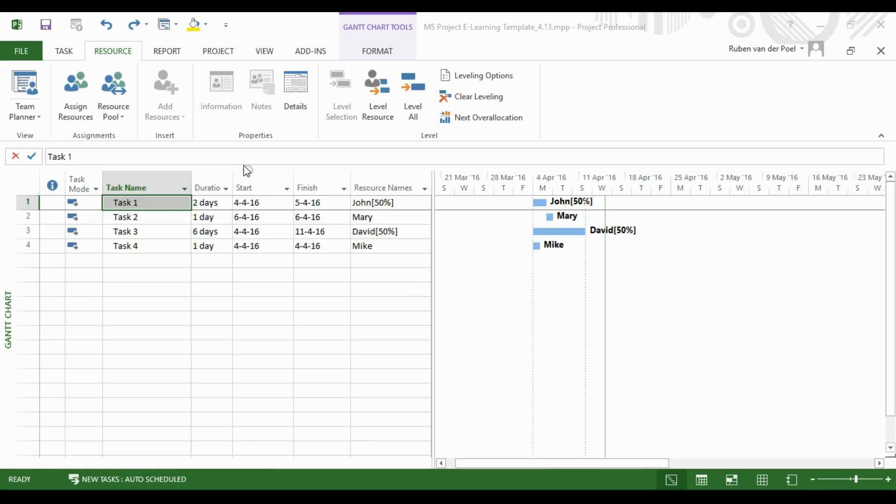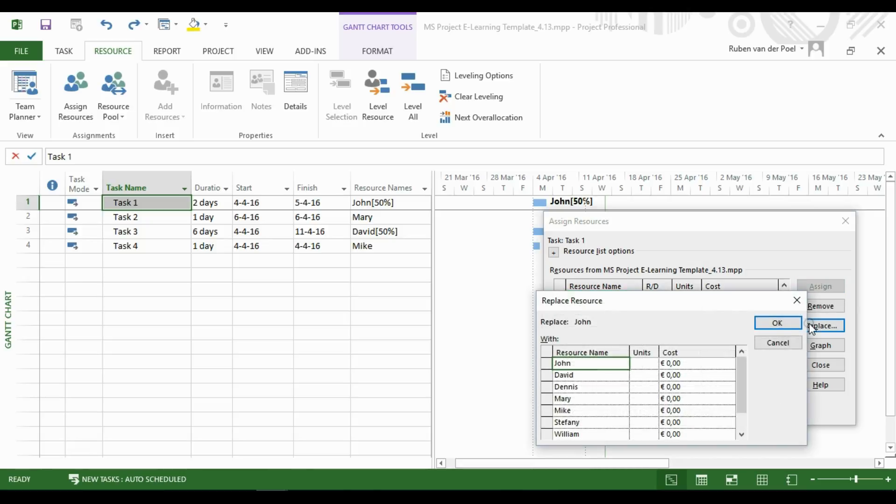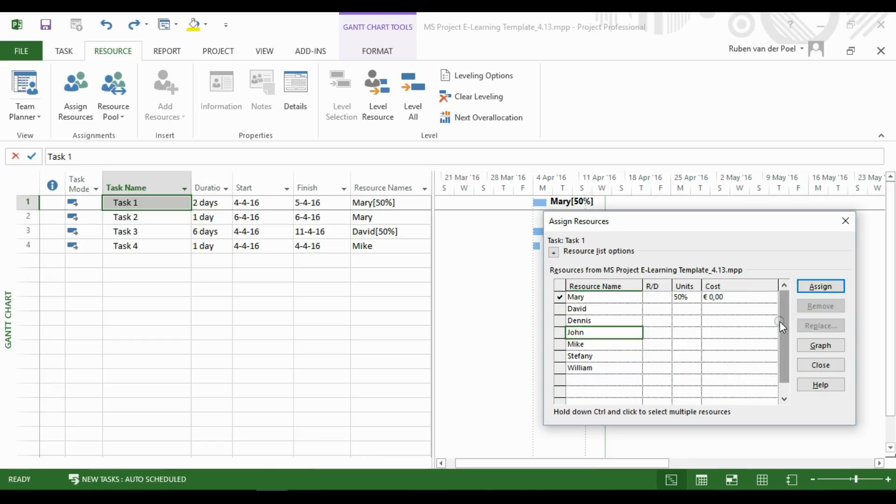To replace a resource, go to the Resource tab, select your task, and then Assign Resource. Select the old resource, then click Replace, select the new resource, click OK, and then Close.